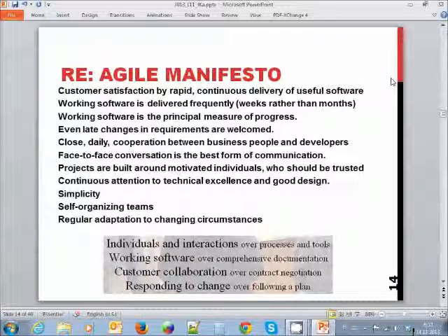Well, and the last part responds to changes during the project instead of following a plan. It's more or less about risk management. Agile projects tend to usually be smaller projects which can adapt to changes, like some key personnel leaving the company, or competition releasing similar products, or laws changing so that your product is now illegal to use, or things like that.